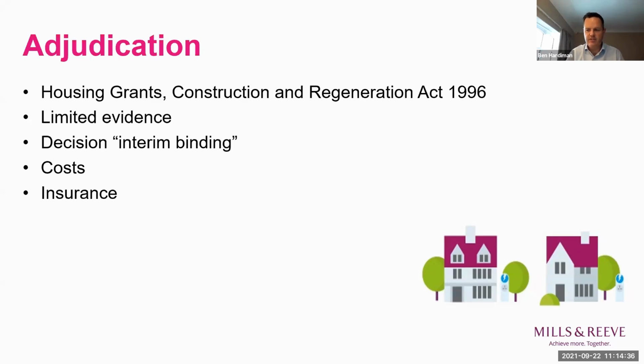Unlike litigation, there's no disclosure exercise. There's no exchange of witness evidence. There's no exchange of expert evidence. Details can be submitted with the statements of case, but bearing in mind the timescales, and bearing in mind this may come completely out of the blue, you may well really struggle to pull that together. The adjudicator can call the parties to attend a meeting, but doesn't have to, so you may well not have any oral submissions. And ultimately, unless an extension is agreed by both parties, the adjudicator has got 28 days from service of the referral notice to reach the decision.